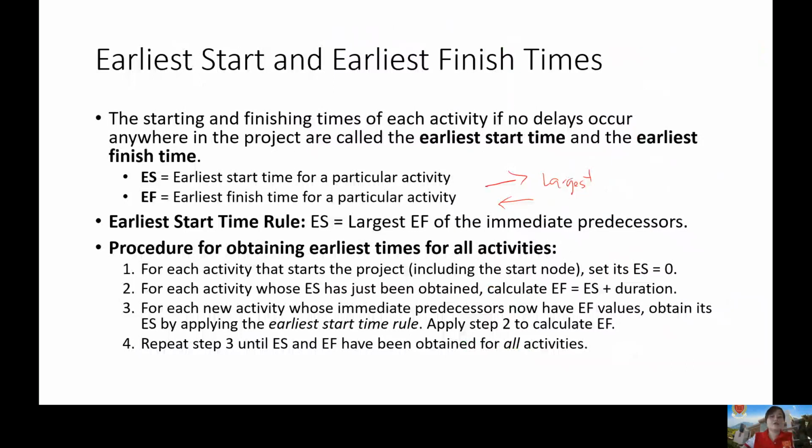Okay? So normally, we are constructing our nodes like this. If you are solving manually and have no software, we can construct the nodes manually. Each node has this. For example, it says A, and then the duration is 2 minutes. Just as an example, the duration is 2 minutes. This is your earliest start, earliest finish. This is your latest finish, latest start.